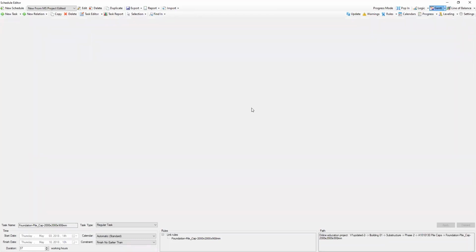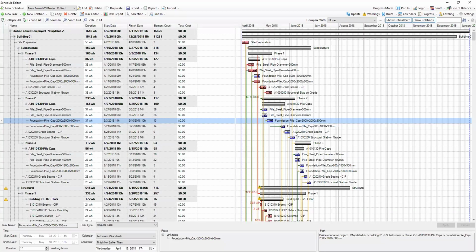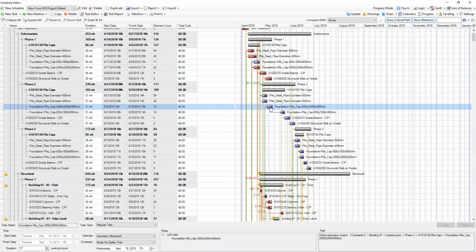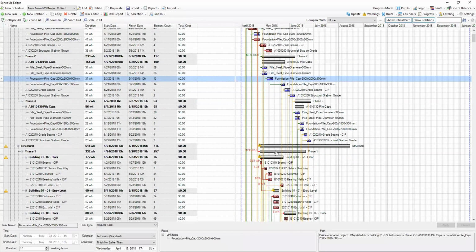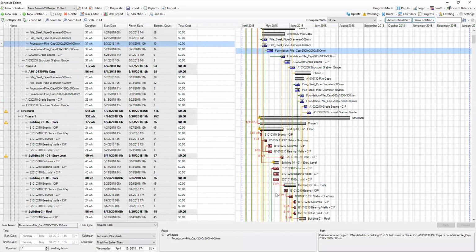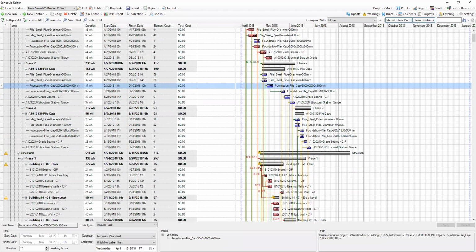Because if you're just looking at the Gantt chart, you're not able to see if a specific activity at the same time actually takes the same resources which are supposed to be reserved for some other level or similar things.